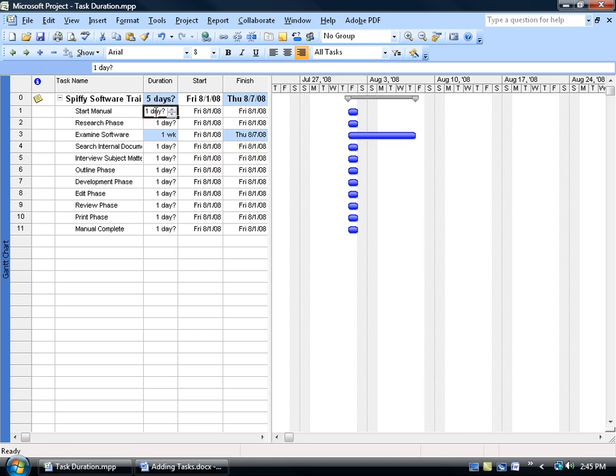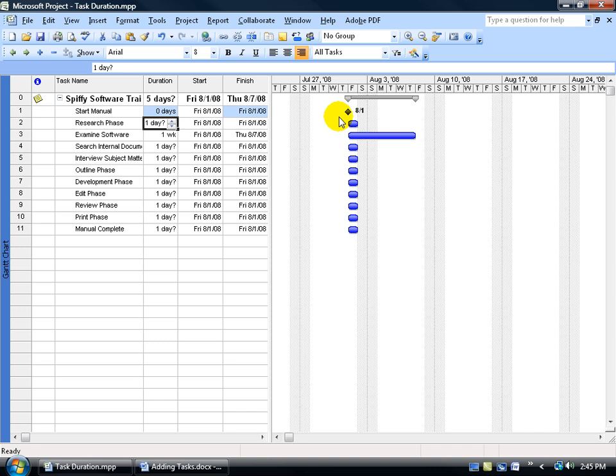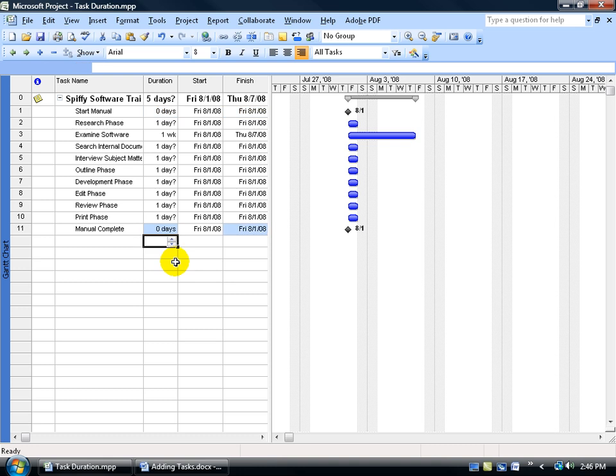Let's start with our start manual here. Now, starting a manual doesn't take a day or two days or minutes unless you've got this big send-off party. I'm going to introduce you to what's called a milestone. By typing in the number zero next to any task, it turns it into a milestone, and you can see it representative over here in the Gantt chart by a black diamond and the date next to it. Milestones are like major points in your life, or in this case, the project. A major point in the project is actually starting the project. By the same token, another major milestone or point in the project is completing it, so I can type in zero for the manual complete.